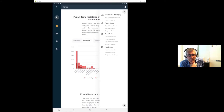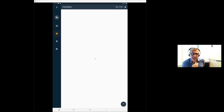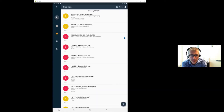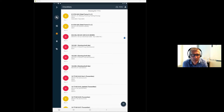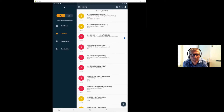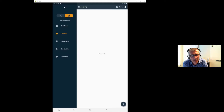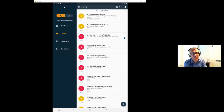If you click on the checklist icon, you see all mechanical completion checklists. Clicking the top left corner arrow lets you switch between mechanical completion and commissioning. This is how you toggle between MC and commissioning views.